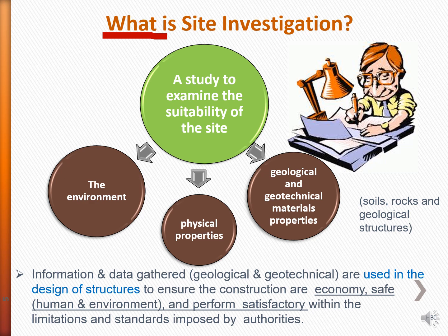Alright, so now I will talk on what site investigation is all about. Normally the site investigation is conducted during the pre-construction phase. A client needs to have a clear picture of the site condition before they proceed with the construction works. So the team hired by the client needs to observe or assess the site, which covers the geotechnical aspect, including the surface and subsurface, to address if there is any potential hazard at that particular site.